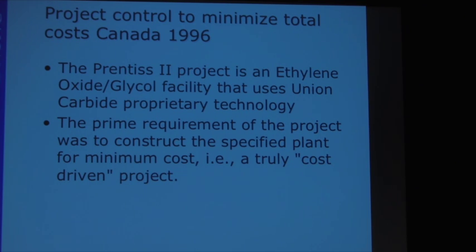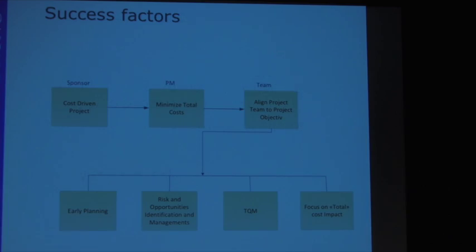Because at the beginning of this project, after 6 months, they discovered that the technology they were basing the entire facilities on was outdated. So they decided to change that technology, and changing that technology required changing the design, changing the specification, and then the budget went totally wide. So they decided we should rethink the entire thing, right? And we need somebody to come and help us keep the cost as minimal as possible. So, minimize cost. What did the project organization do?